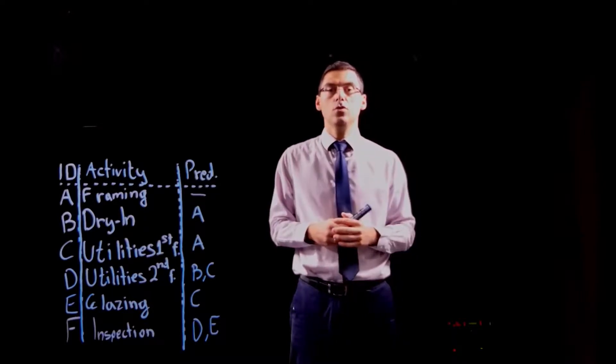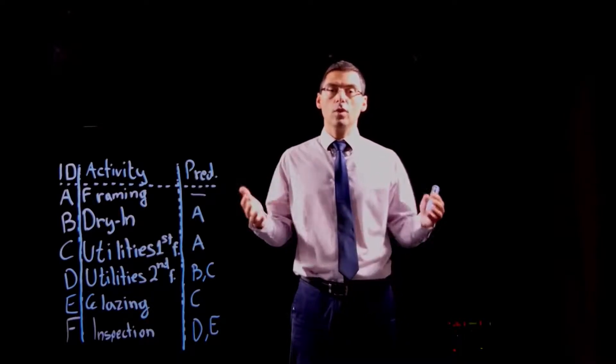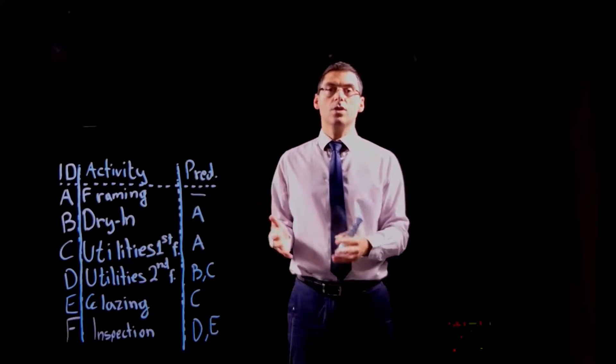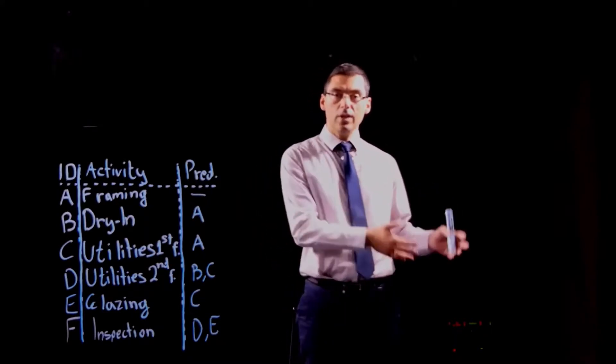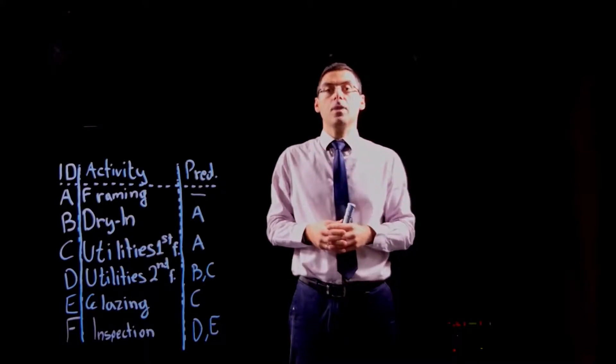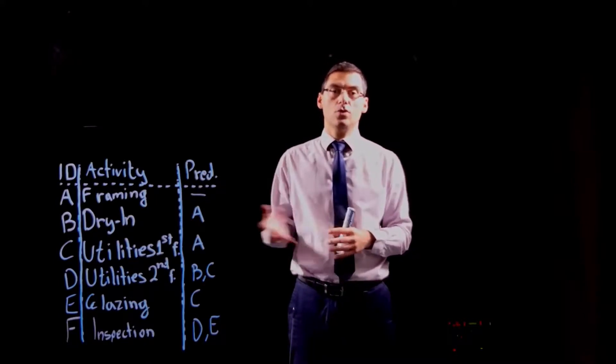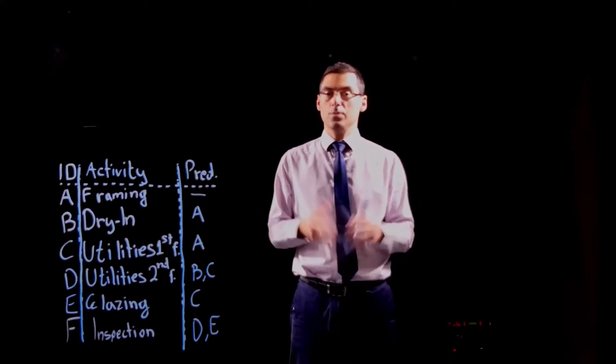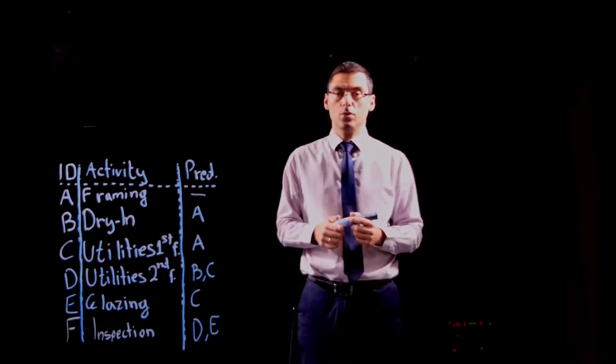So the first thing that you need to do, never forget that all the projects start with a milestone which is the milestone of start and finish with another milestone which is the milestone of finishing. You won't find usually these milestones on such tables but keep in mind and put it on your network.